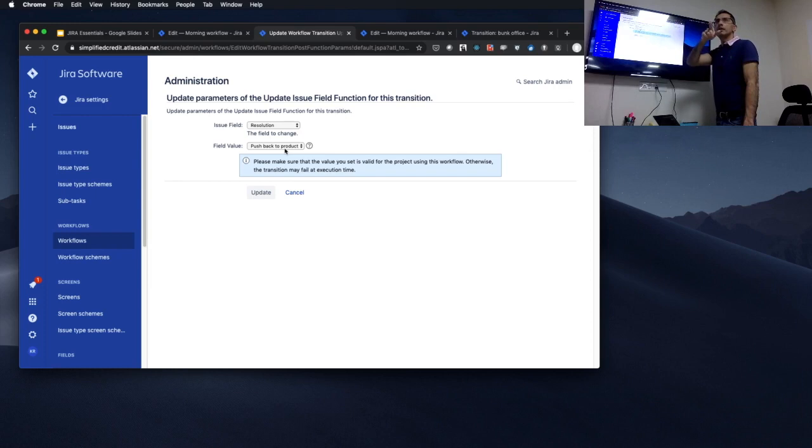But if your intention is still to do anything on that ticket, you want to preserve the view and the history and everything, then you should make that a status so that it still appears on the board, still appears in the backlog. People can look at it, comment on it, do any action on it. But if you don't want any further action on the ticket, then resolve it and give it a reason for the resolution.